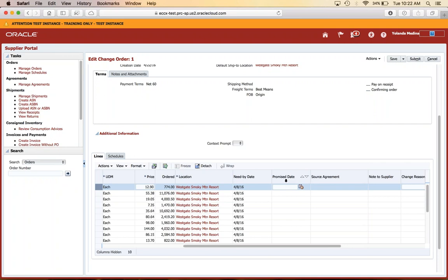If they are items that have long lead times, if they are custom items, if they are items that typically do not have a long lead time but are perhaps on a back order or will have a long lead time, in this instance, it is my suggestion that you definitely enter a promise date in this field. If you click in here, you'll notice it comes up with the format. You can either type in your promise date or you can click on the small calendar icon to the right of the field. I'm going to just type in here. I'm going to say that I'm going to promise date this for June 18th. And again, if you click on the small calendar icon, it will actually bring a pop-up calendar and you can just click on your date there.